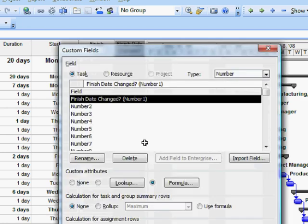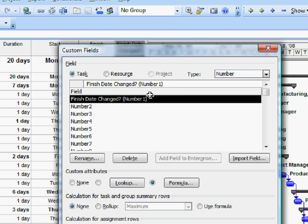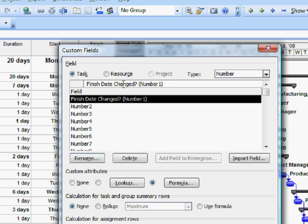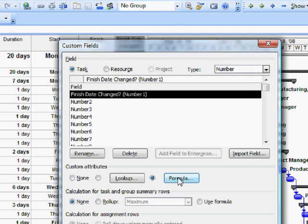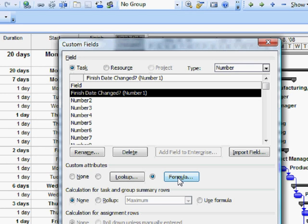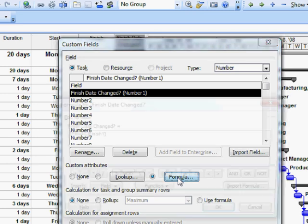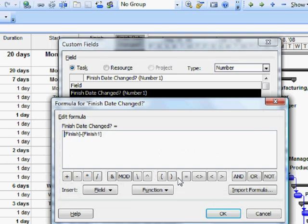It will now default to the field we were hovering over. Notice that what I did is I customized the Number 1 field. All the other Number fields are still here in their original condition. But I customized Number 1 by hitting Rename, changing the name. Then I created a fairly simple formula here. You'll remember that setting the interim plan copied the Finish Date into Finish1, so here I've made a formula which compares those two finish dates.